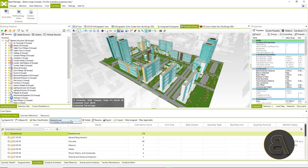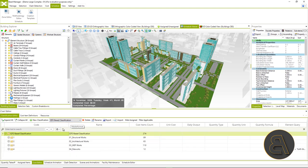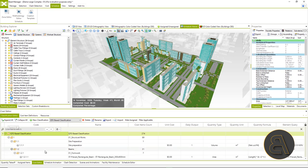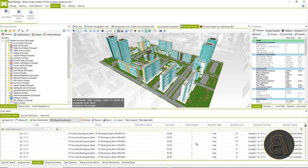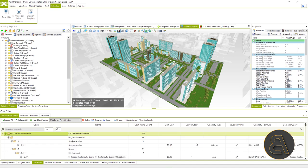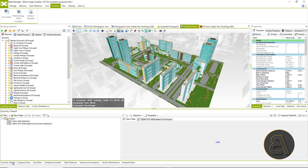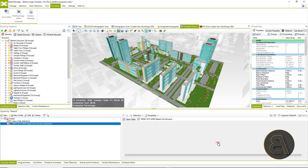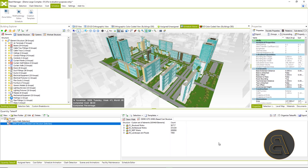The cost structure was also created with the help of the creation wizard, just a few steps from the model-based quantity takeoff. The created structure can be changed at any time, supplemented with a new structure of bill of quantities or individual positions in order to achieve the desired structure.